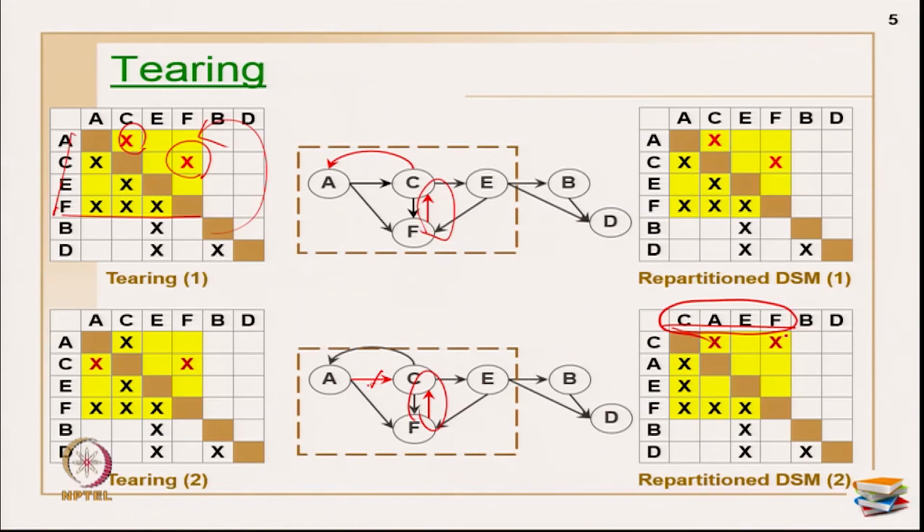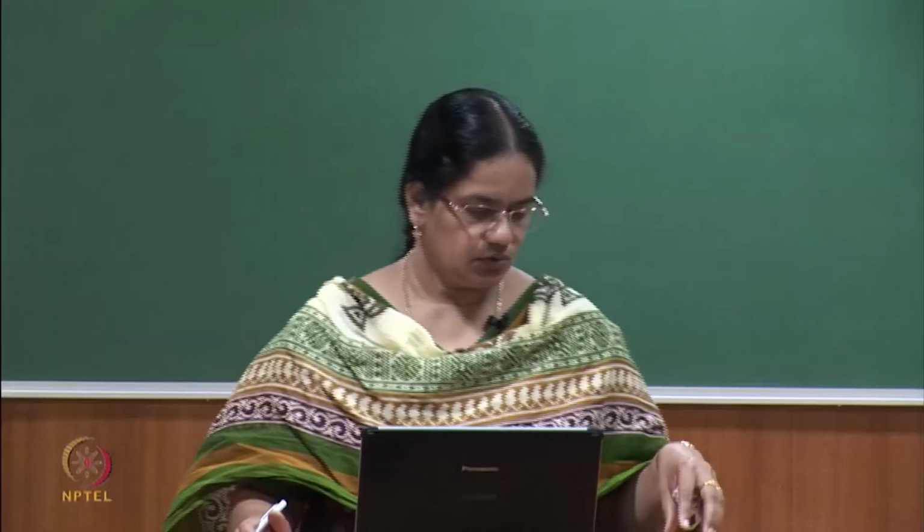entire project execution. Okay. You got the data formation, partitioning, you got the overall stretch or sequence of the whole project along with block identification. Tearing, you are actually finding out the sequence within the block, you have done the tearing process. Now, the next question that comes is: is this a better sequence or is there any other sequence which is really